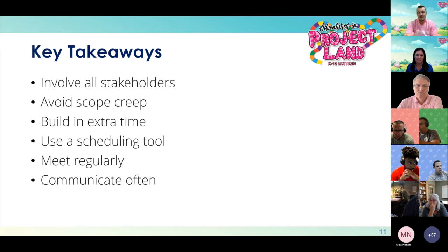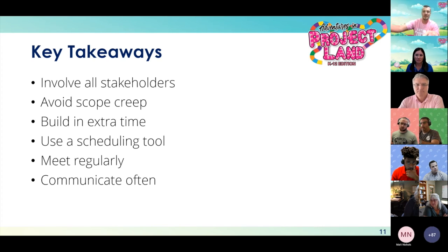When you're talking about contingency time, I would say keep your contingency time as a separate pocket. Like Natalie was saying, don't pad every task by a day, because if you tell staff they have a week, then they're going to take a week. They're going to use your contingency time completely. Keep it as a separate budget, so the whole phase of the project has an extra 3 weeks of contingency, and then take that and apply it as needed. That's one way you can carefully use it, and kind of don't let anybody know you have it.